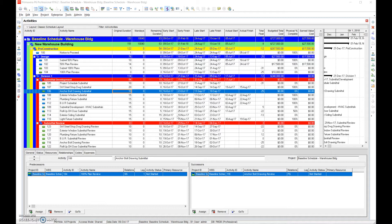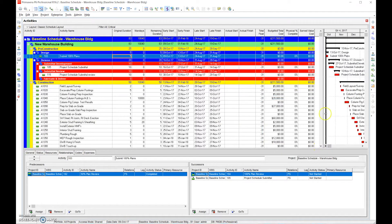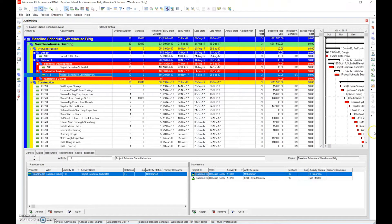When we look at the critical path — which we can filter by critical — we can look at the critical path tasks. If one of these tasks, say the review, set us behind, or one of the other tasks that was the client's responsibility set us behind, we don't have to do a recovery schedule. That is the client's responsibility. You would be entitled to a change order, and the schedule update would serve as supporting documentation for your time impact analysis. So if you do a schedule update and you're behind because of something the client, the government, or basically anybody outside of your responsibility caused, you wouldn't do a recovery schedule.